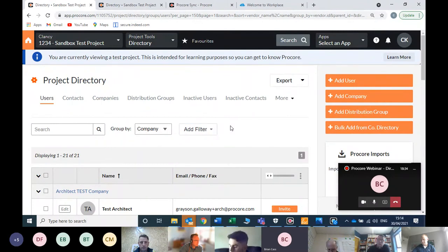And just on the permission templates as well, they're standard permission templates that we've set up, but they can be customized. So if there's a tool in there that you don't want an external stakeholder to see, but it's not on the standard permission templates, it can by all means be customized to what you want. You probably see there are permission templates for dockets, set up primarily for Mary Den, so that when she goes to look at the dockets, the only thing she sees is the site diary. She's not muddled or confused by the 8 or 9 other application tools within Procore. She can go straight into the site diary and the docket section and pull them down from there. So that is a customizable feature of that tool.